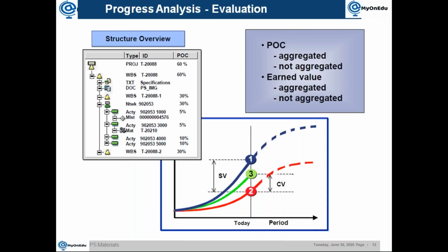So this is available, and there is a standard report available. Then we need to do that. Then the only thing is POC. It's every month, because in SAP the shortest period you can calculate is month-wise progress only. Sometimes if your business asks, I want week-wise and all, anyway, that concept is not there. The shortest period available in SAP is month. So normally it is reported monthly only.